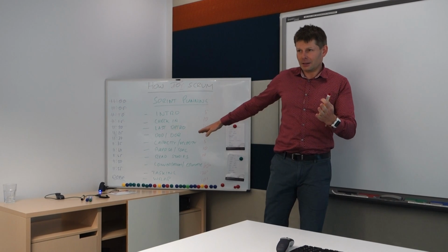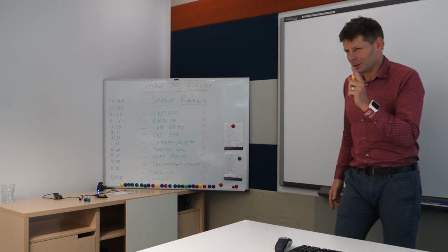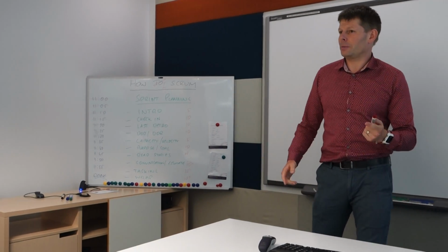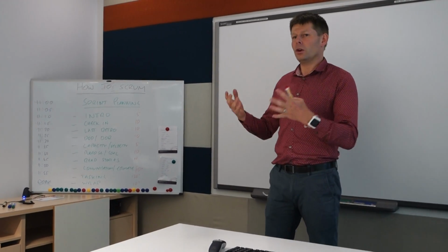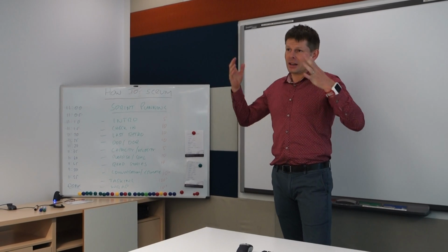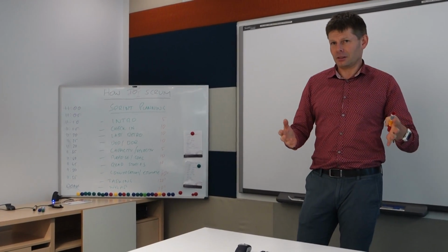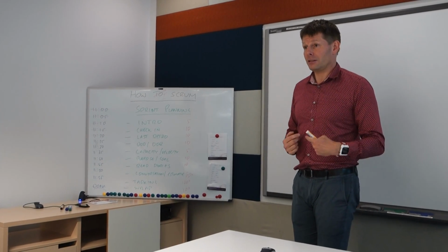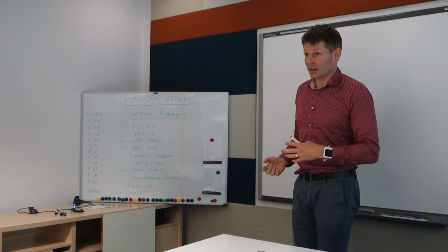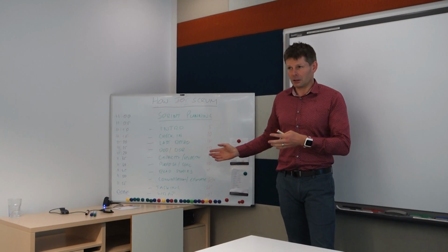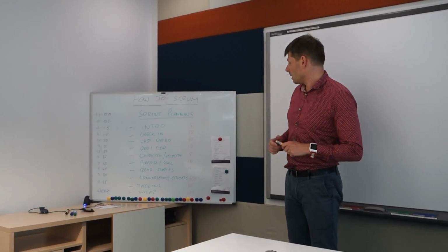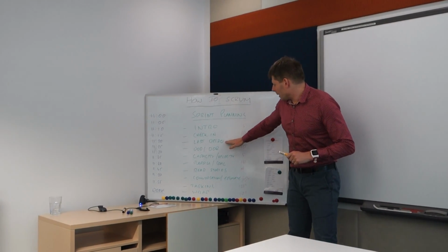We're in sprint planning. We're assuming now this is sprint 2 because we've had a sprint before us and we did a retrospective. And as you know, in a retrospective, we as a team agreed to change 1 or 2 different things, so in the next sprint we're slightly better. This is in the spirit of Kaizen. So what I want to do is reinforce that retrospective, so we don't just do the retro and forget about it. It's going to go on the sprint backlog as something that we agree that we're going to commit to doing for this sprint. So we've done the last retrospective.